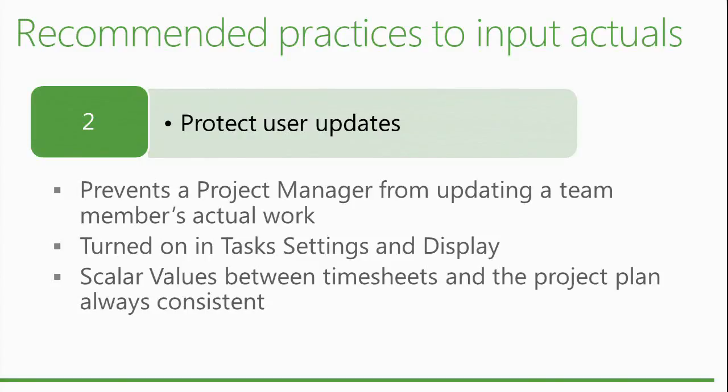In some instances, the scheduling engine is going to distribute the hours, even the actuals, in a slightly different way than they were entered by the user. That's because the scheduling engine is looking at future planning, as opposed to the timesheet, which is capturing the data as it has been spent, in the past.